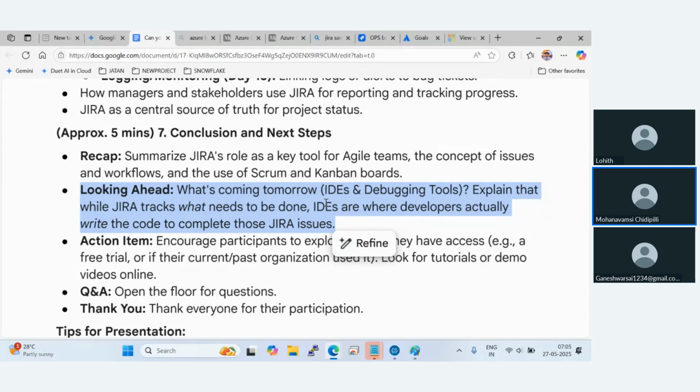If you apply a similar thing in a project, say you and Lohit are creating a web application. What are the things involved in the web application? Maybe getting servers, that is the first thing. What is the budget for the servers, how much RAM and CPU I need, and what domain name I have to have. So everything can be added to the backlog. All the things will be added to the backlog. From that backlog, we will pick one by one based on the priority.